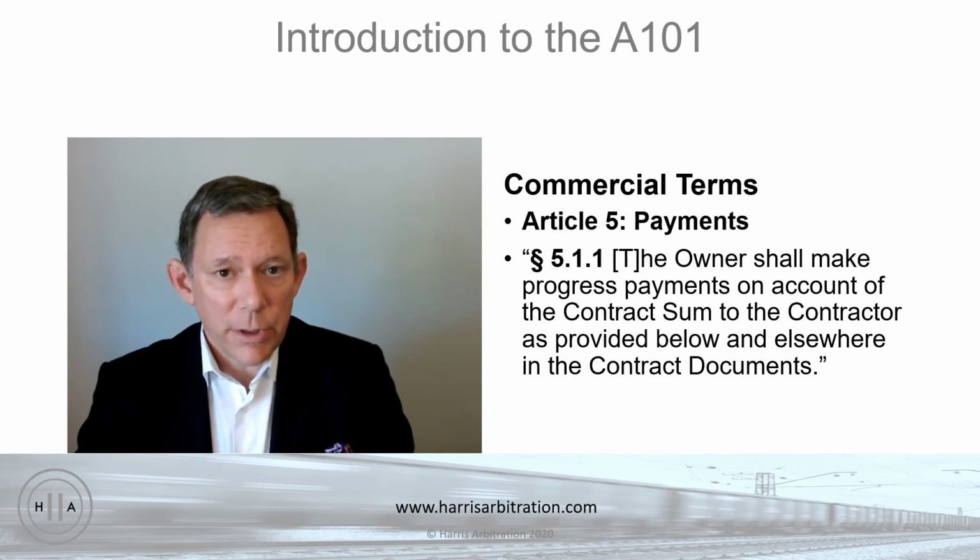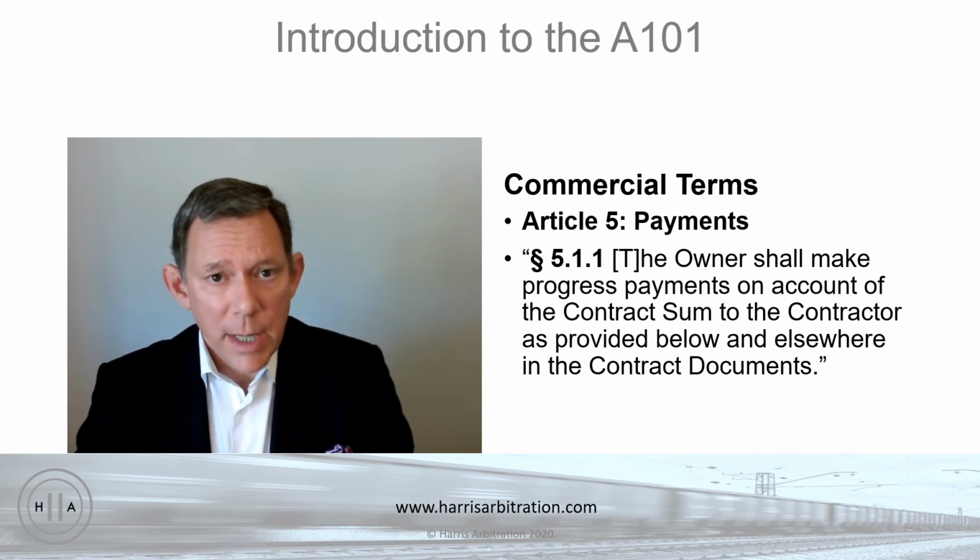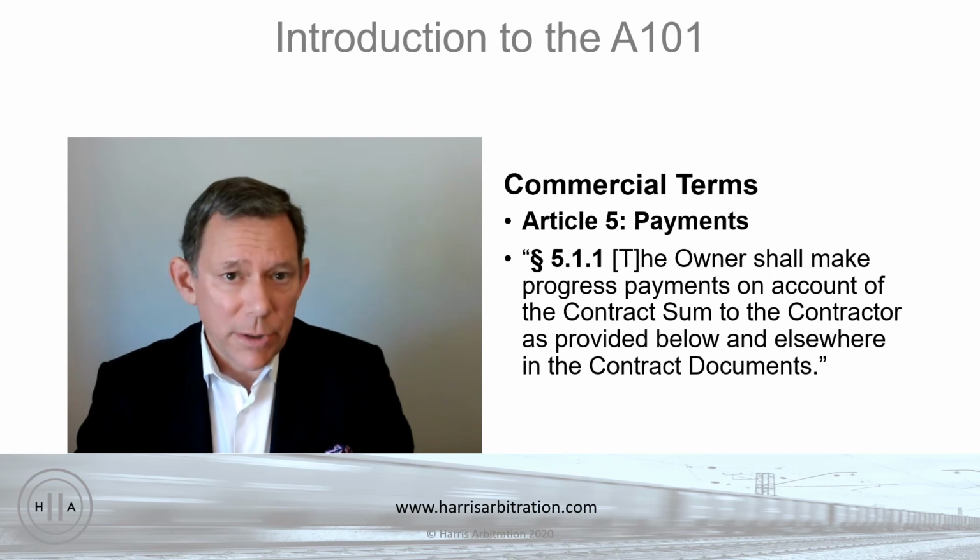And so in order to change that rule, construction contracts, generally speaking, like in my skyscraper example, that would be considered an entire contract, not a severable one. You've got one contract sum in exchange for one skyscraper, not the contract sum parceled out according to different bits of the project, usually.